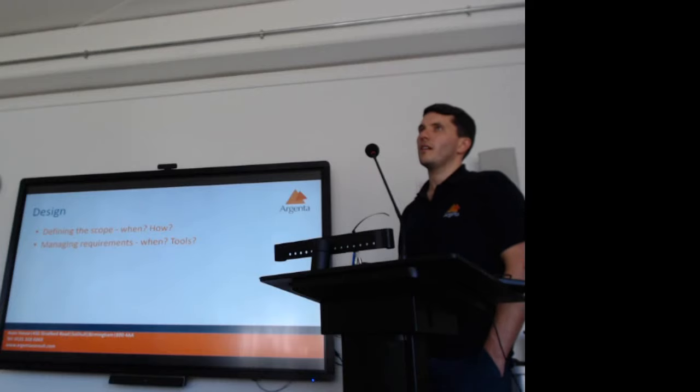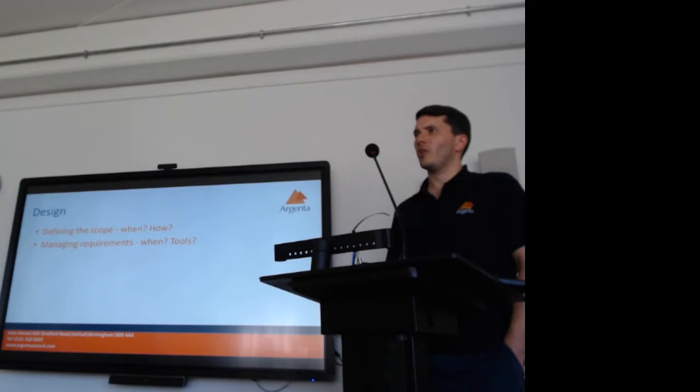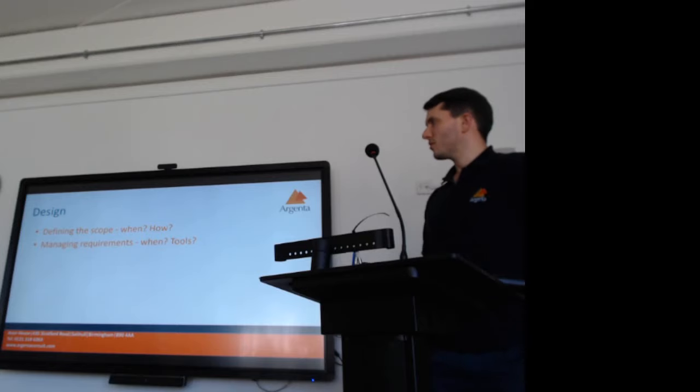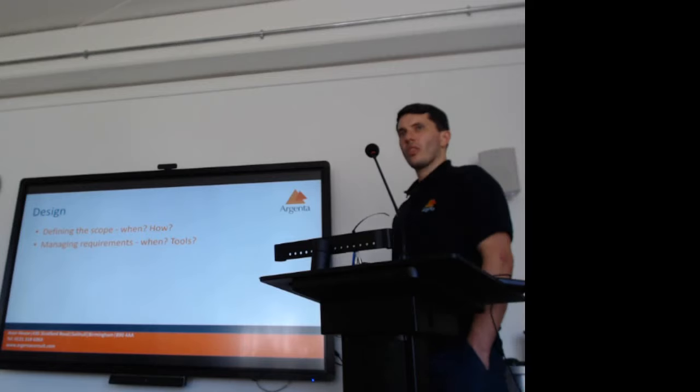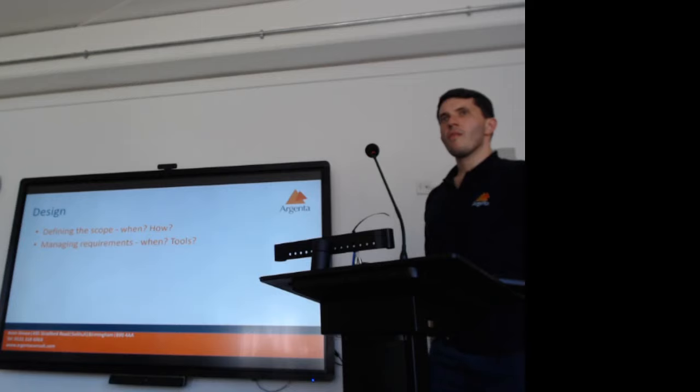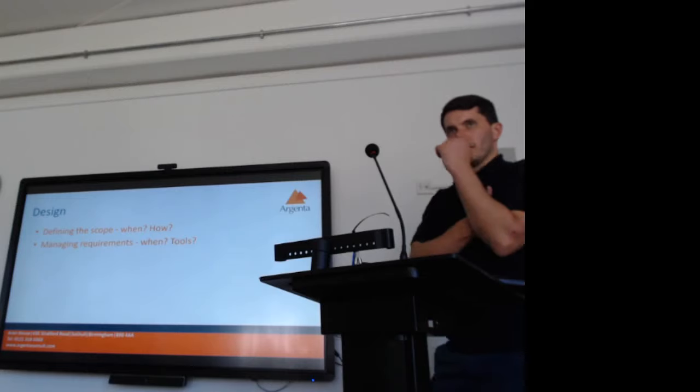I think Excel is probably a pretty common tool people use for requirements. We take all the UML use case stuff, and we end up having to write either a specification and then a software specification, which defines functionality a bit more. This is more on the embedded side. But then the Excel tool is a design verification plan that links every requirement to the test required, which I think is what Leah was saying, to prove that it's been done. And that then makes it easier to manage additional requirements.